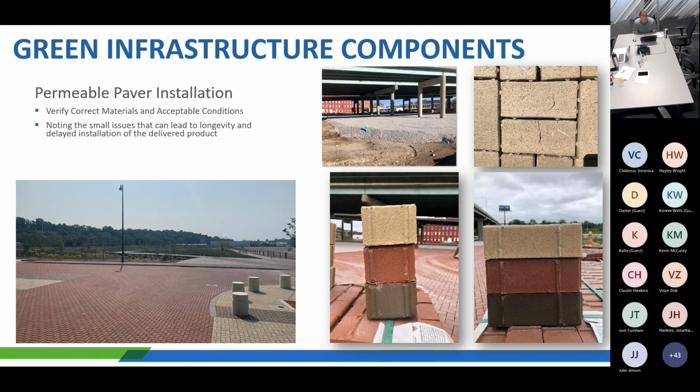When they did deliver the second set, he did notice that there was a bit of a size difference. With this size difference, it called for some design changes. The particular identified pattern wouldn't work with the tan pavers being this large. So kudos to the RPR. This is just an example of keeping a close eye out. Small things make a big difference.